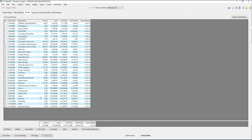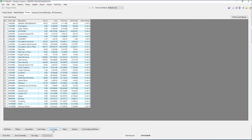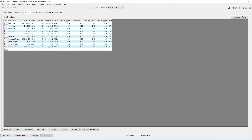Recap by cost code — this is the information that we'll export to your budgets. Note the cost code number, labor hours, costs, extensions, overhead, and profit. Recapping by cost type then gives us the cost, overhead, and profit as well as gross margin by individual cost type: material, labor, subcontracts, etc.